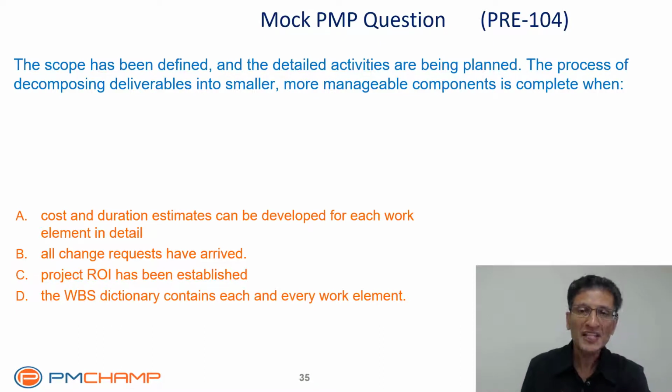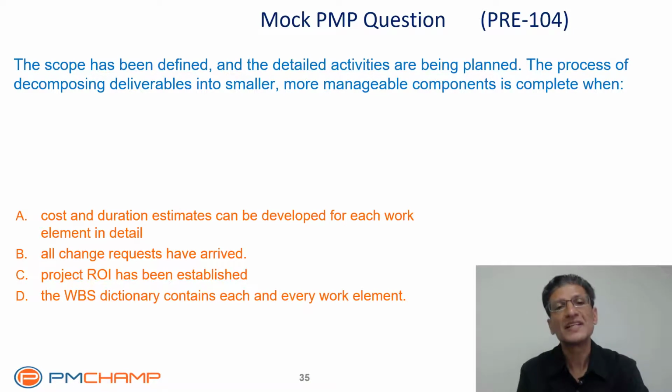But beware, just because the work is in the dictionary doesn't mean that the work is complete. The work will only be complete when the cost and duration estimates can be developed for each work element in detail. Only then can we say that the process of decomposing the deliverables has been completed successfully. So don't be too alarmed if you couldn't answer this question, because this requires knowledge of the terms plus an understanding of the processes and what comes first, what comes next. But never mind, learn from this and improve.